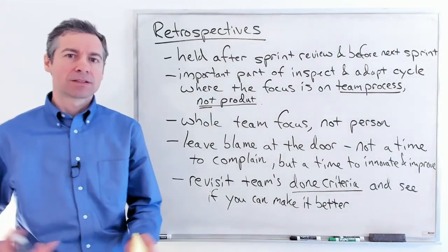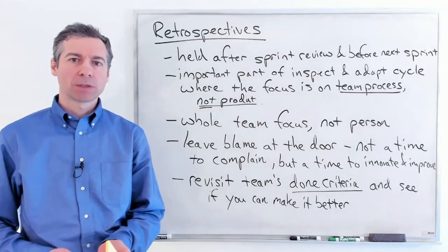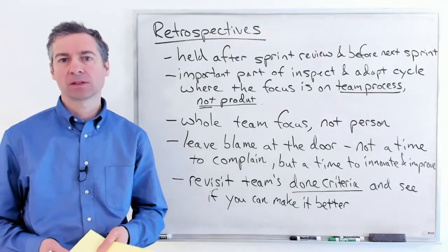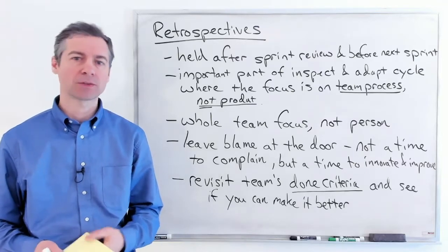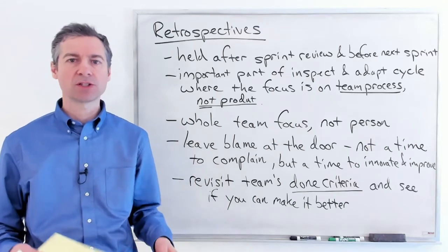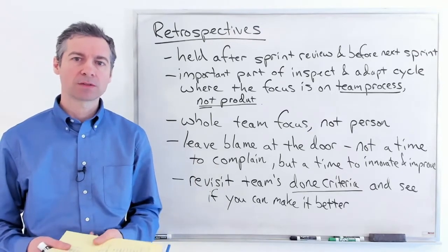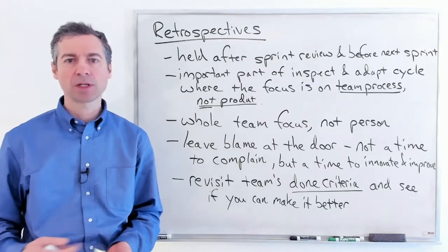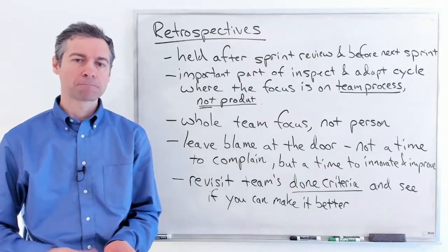All right, it's time to get back to our Scrum process. And the last big thing in the overall process, remember we start with sprint planning, then we go into a cycle each day where we hold our daily Scrum or our stand-up, we do some work, then the next day we meet again with our daily stand-up.